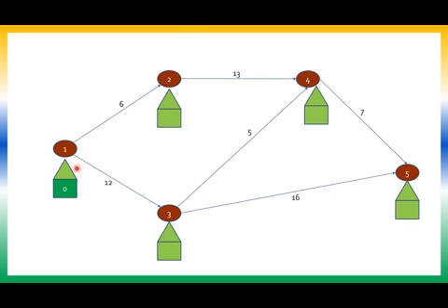So with the available network diagram, what are we supposed to do? Forward pass computation and backward pass computation. In the forward pass computation, starting value is 0. So 0 plus 6, I get a 6 here, and 0 plus 12, 12 I get here. Then here 6 plus 13 is 19, or I get 12 plus 5, 17, which is maximum, 19.